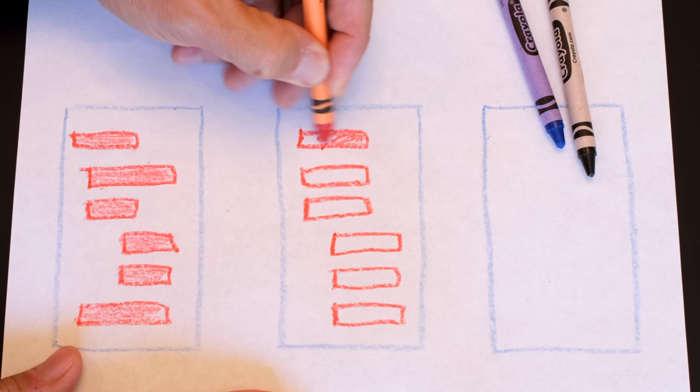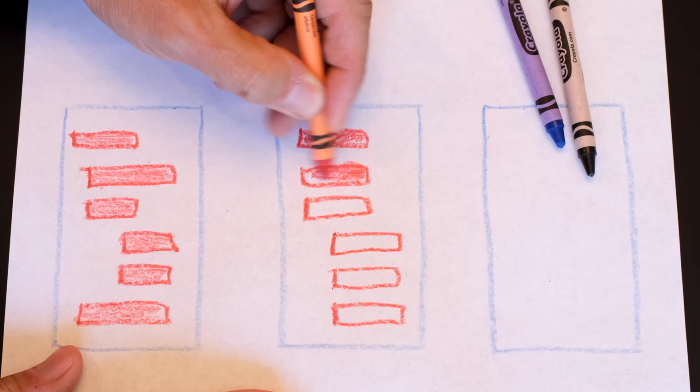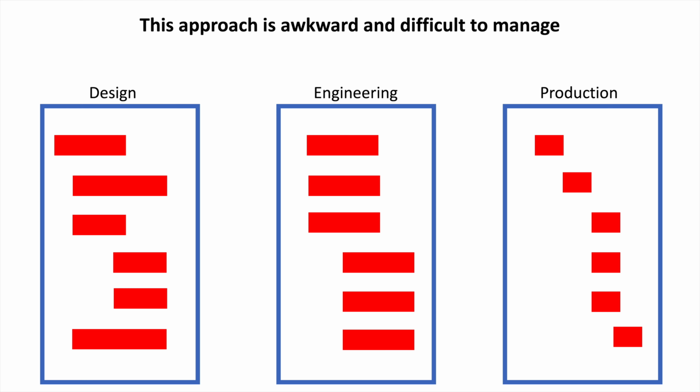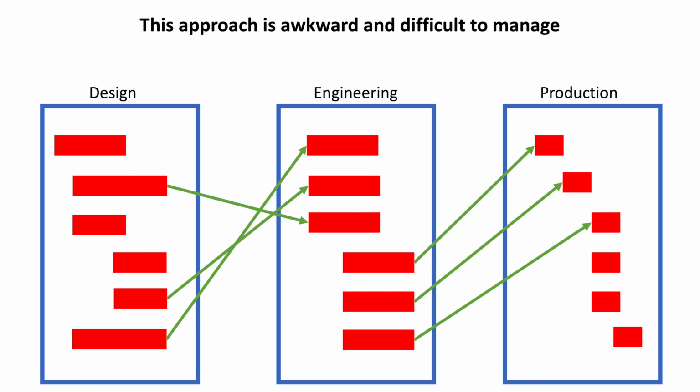That same logic can readily apply to your own project schedule. Now, don't get me wrong. Many of my own schedules, especially the ones that I constructed early in my career, had handoffs between functions all over the place, not necessarily in any kind of giver-receiver format, from a detailed activity in one area of the project plan directly to a detailed activity owned by a different function somewhere else in the schedule. While I was certainly able to trace critical path and produce reports from that type of design, the reports were jumping all over the place from function to function, and it was hard to follow even for me, who had actually built the schedule myself.